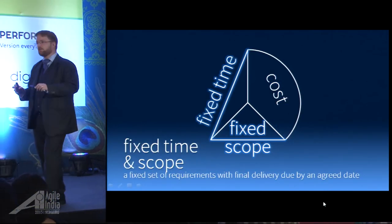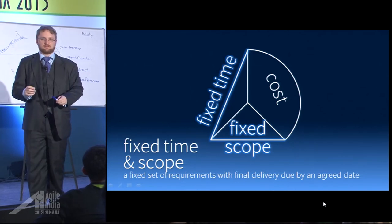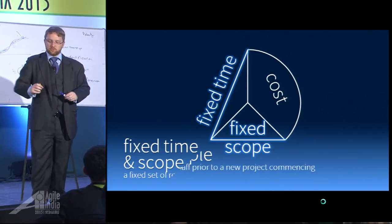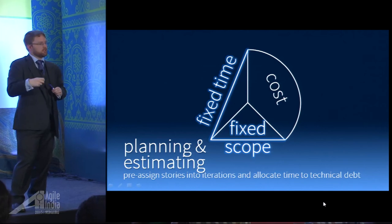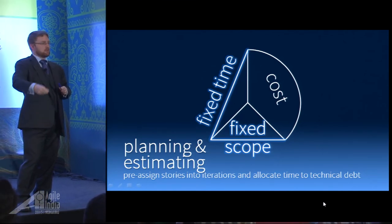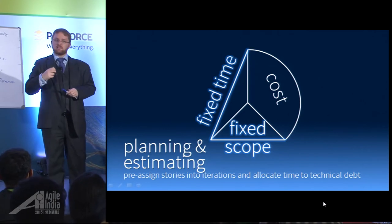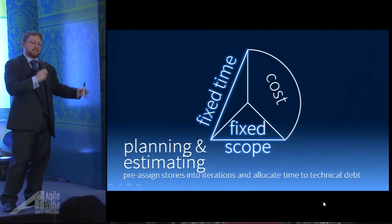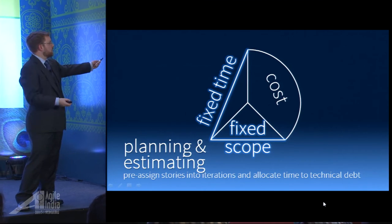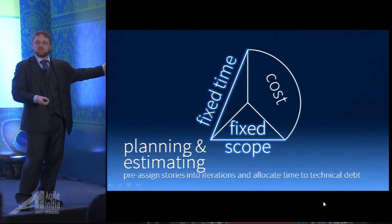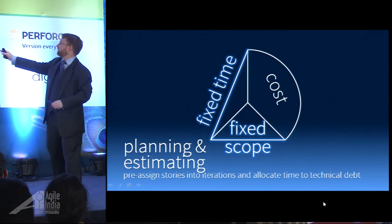What about fixed time and scope? This one's not too bad. Why? Because we can add new resources. We know what the outcome is going to be, and if this is a simplistic repeatable project, we can probably estimate the duration easily. The problem with fixing is it doesn't allow you to manage the unexpected — we manage the unexpected with money. This type of contract is usually only used internally, not between external partners, unless they have some sort of strategic partnership.